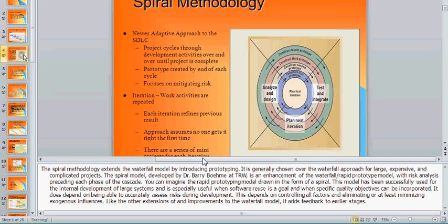Correct? So if you look at the overall picture, had I really been in the design development phase of the waterfall project, I probably would have used up $70 or $80 out of 100. But because I've broken it down into 2 sub-projects, I've only wasted 25 out of the entire $100.